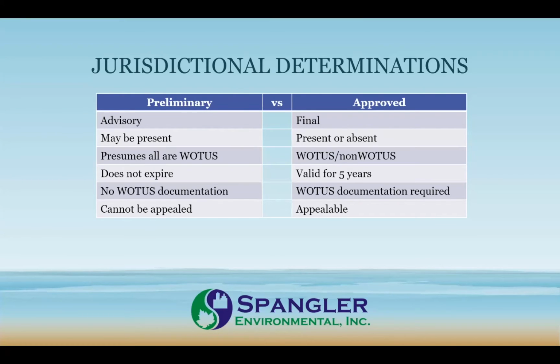That is, if the applicant disagrees with the results that the Corps of Engineers conveys in the JD document itself or in the field as it's discussed, but then it will always be supported by the written documentation. An approved JD can be appealed, and sometimes the ruling and the location and extent of features within what the Corps provides can change.